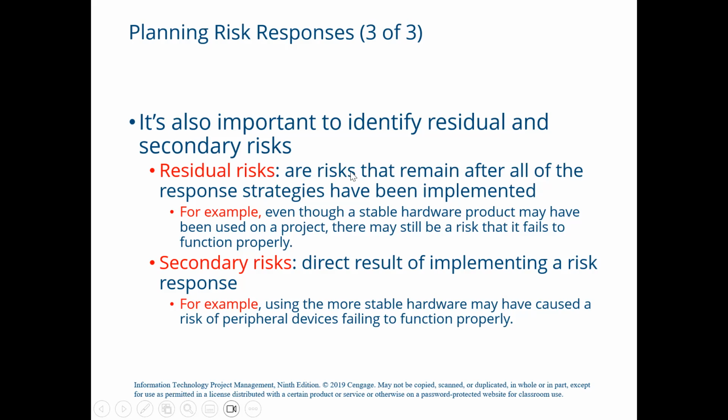Residual risks are the risks that remain after all of the response strategies have been implemented. For example, even though a stable hardware product may have been used on a project, there may still be a risk that it fails to function properly.